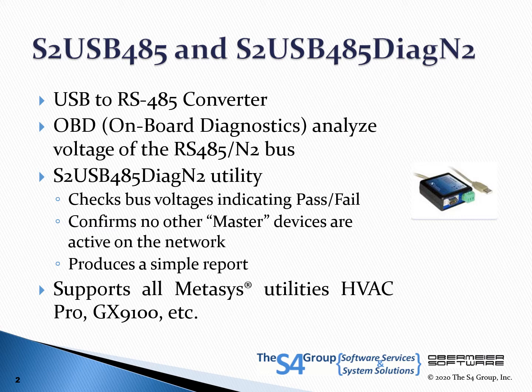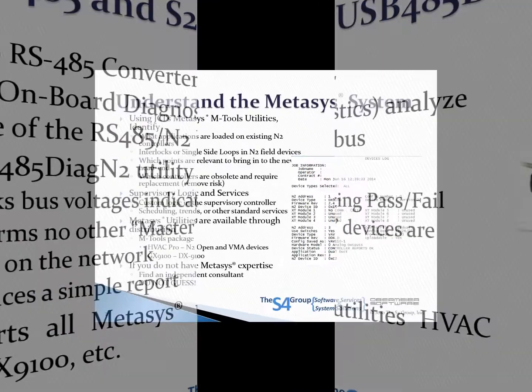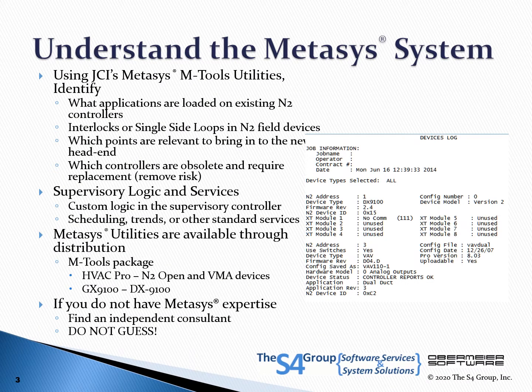Of course, you could use a digital voltmeter to test the bus voltages, and an RS-485 to USB adapter from another vendor should you so choose. The most important thing is that the N2 bus gets validated. The Metasys N2 devices need to be understood at the same level as your own brand of field devices would be. You may need to recommission or adjust the programming in the N2 devices if they have not been properly